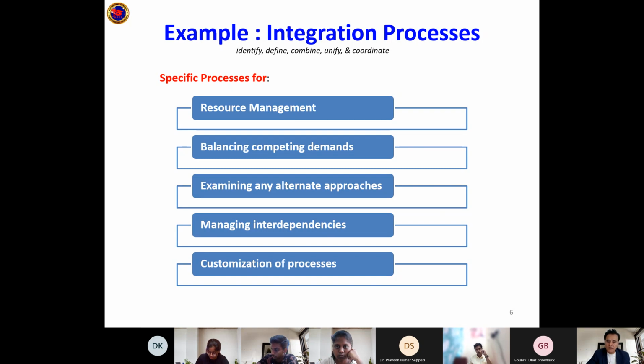It's a very tricky job of a project manager. How do you ensure that everyone is happy? Their bosses don't think that you're taking too much of their time. They don't think that you're pulling too much or you're not pulling at all. So the good balance is how much time. So how will you do that? You will probably have an agreement saying that this gentleman is working in Europe 5 days a week, 8 hours a day, so total 40 hours. For this project, I need 15 hours.